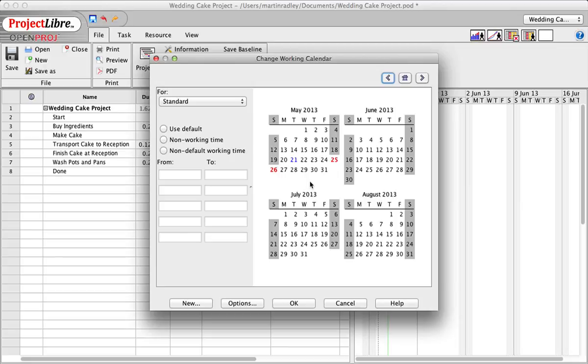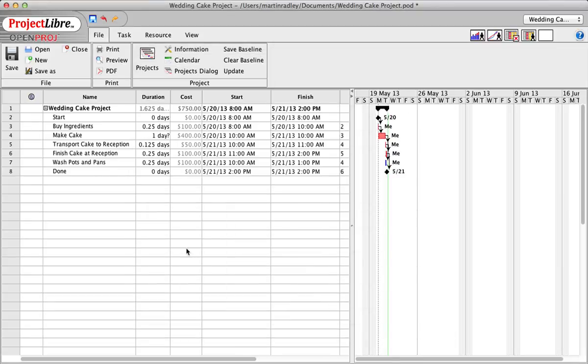Otherwise, if you have a day that's a holiday and you have it as a working day, then once your schedule is committed to, if no one catches that error, you are automatically a day behind schedule. All right. So the second one is make sure the calendar has appropriate holidays in it.